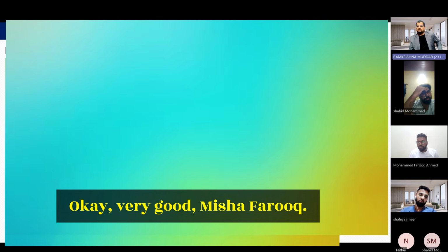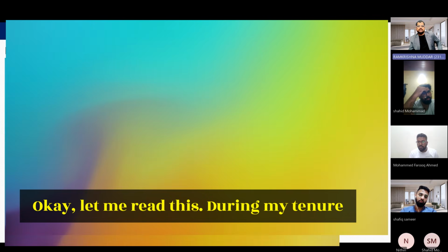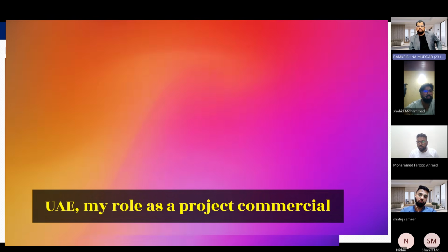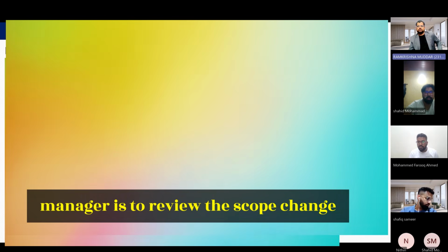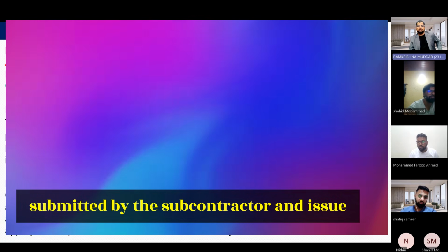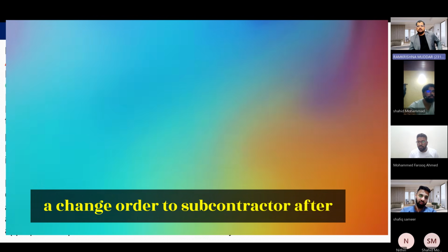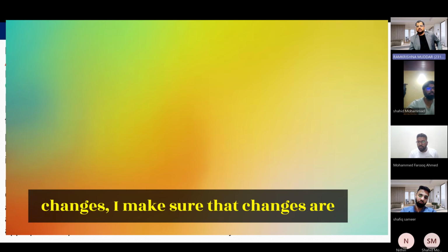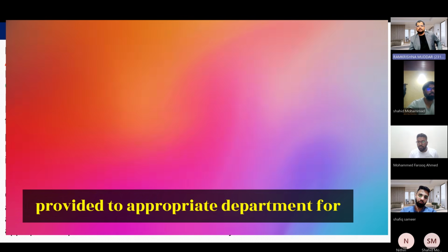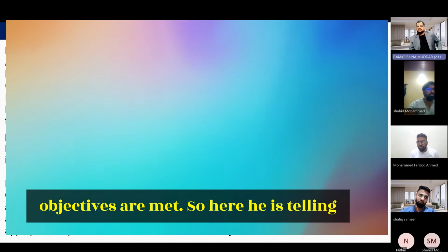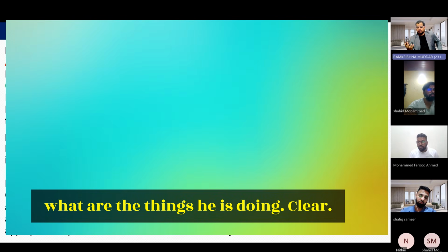Okay, very good, Mr. Farooq. Okay, let me read this. During my tenure in the current residential project in Dubai, UAE, my role as a project commercial manager is to review the scope change submitted by the subcontractor and issue a change order to the subcontractor after management approval. Before approving any changes, I make sure that changes are provided to the appropriate department for review and that their objectives are met. So here he is telling what are the things he is doing.